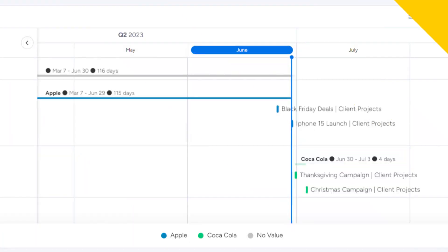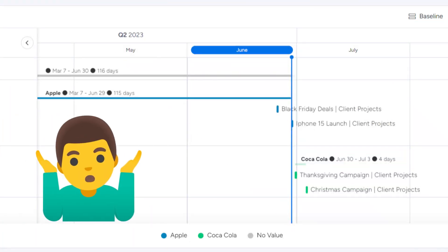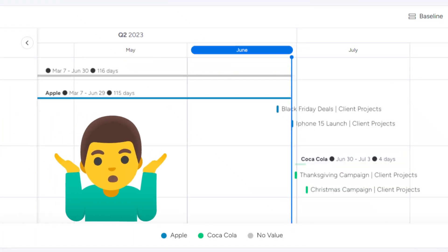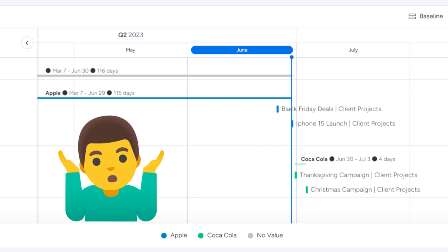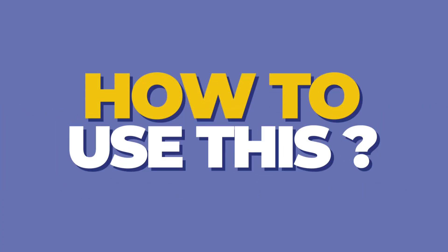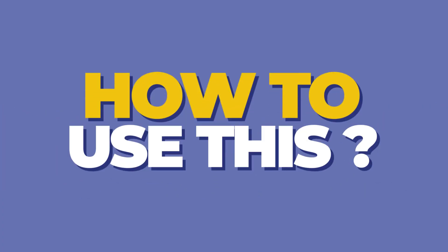Unlike the Gantt view, the Bird's Eye View does not need dates in order to show dependencies. Let's see how to use this.